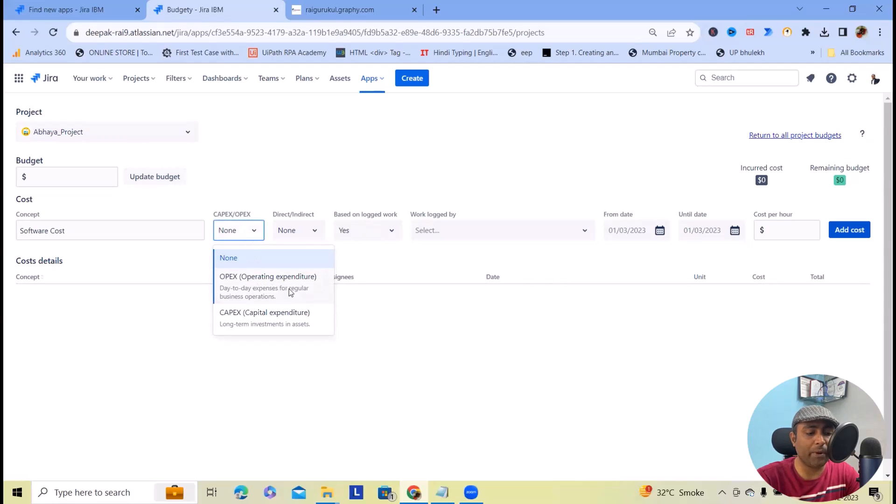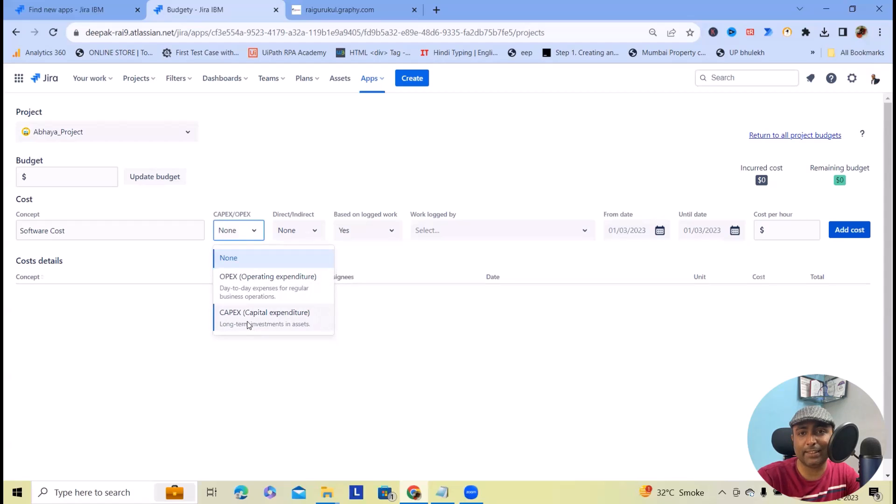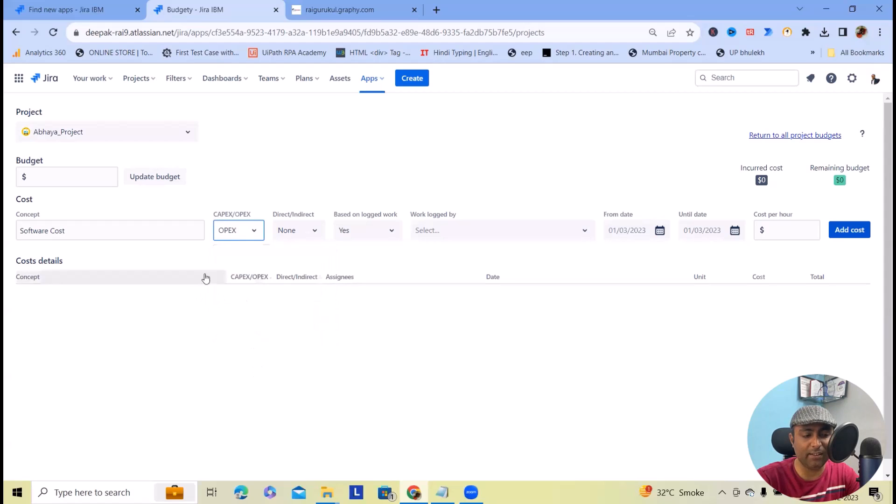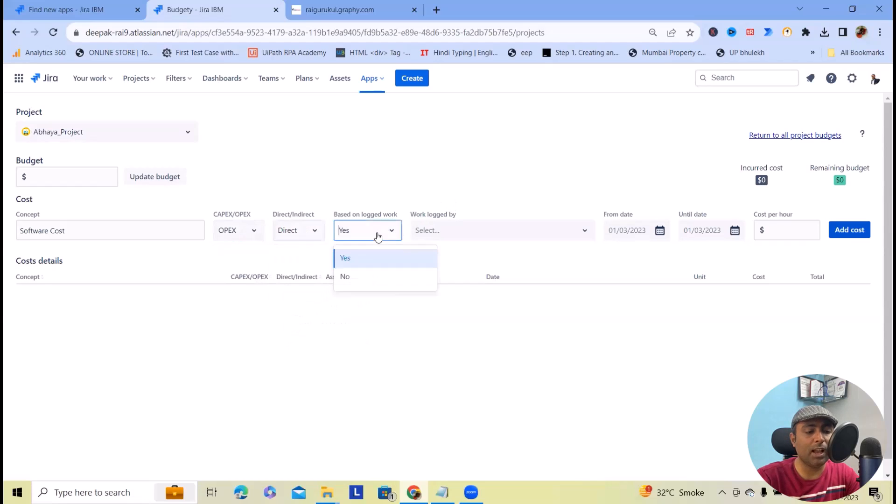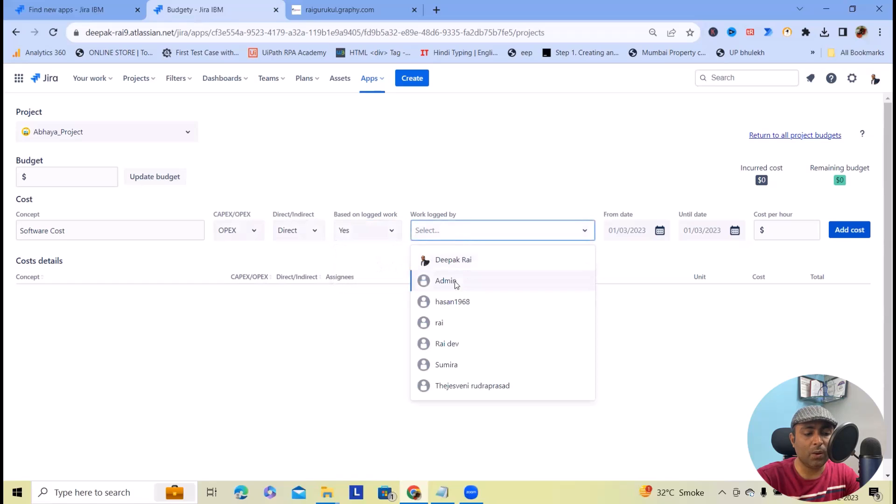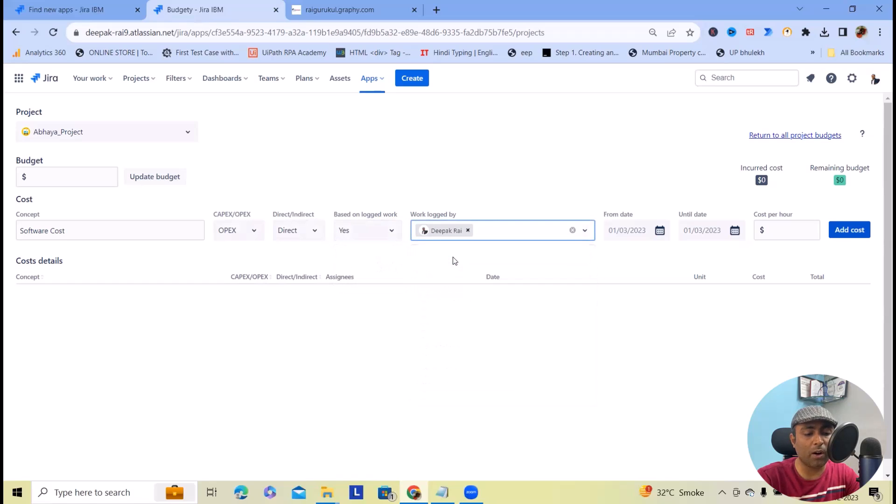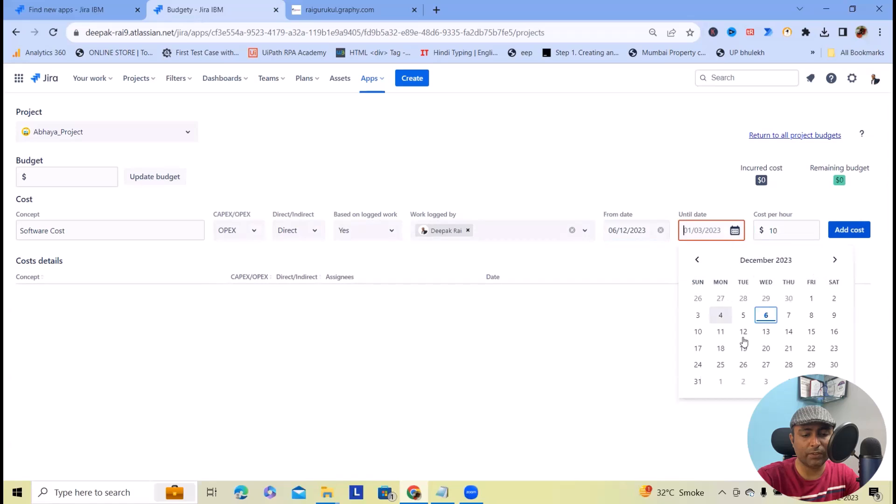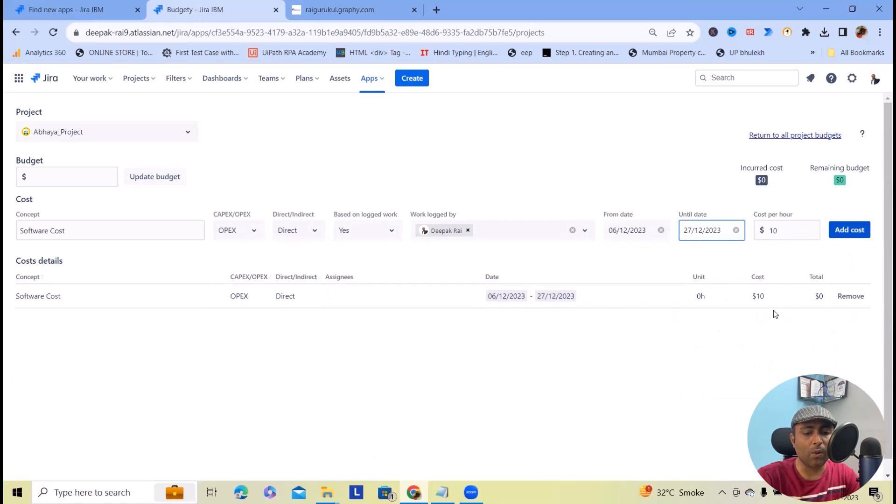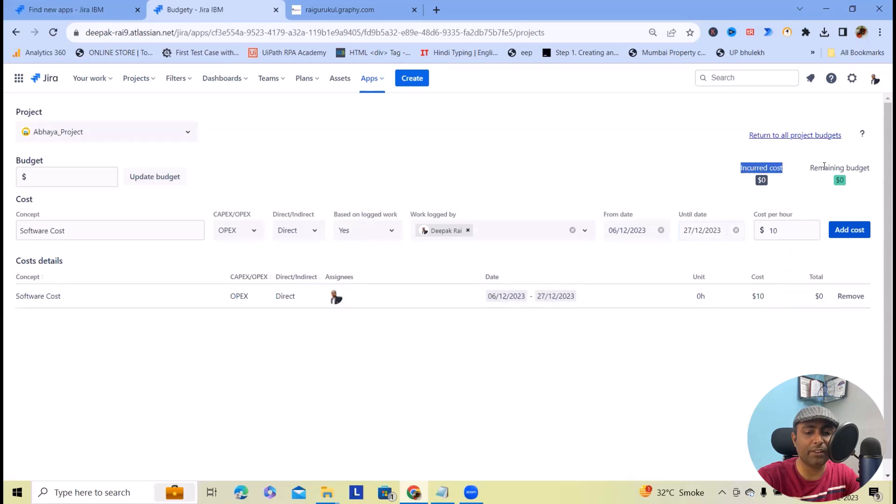We will set OPEX (Operating Expenditure) or CAPEX (Capital Expenditure). Let me tag with OPEX Direct, which is related to project production, and this is based on logged work. I will add $10 as cost. Now we have added a cost of $10.